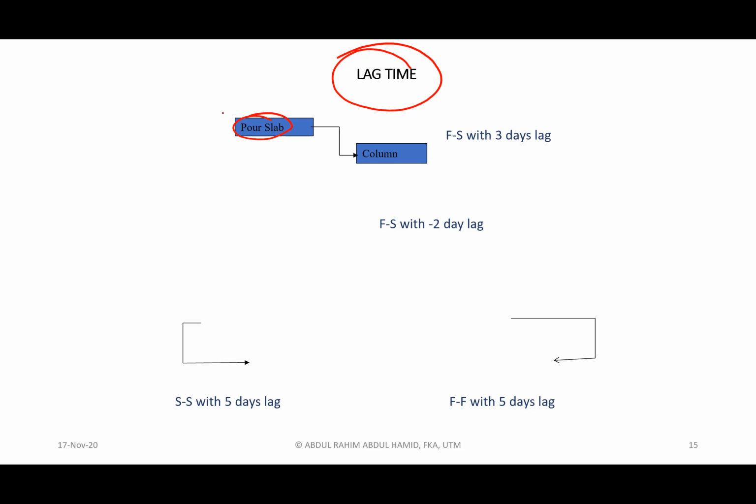But of course, that column should be constructed on a very firm floor. Otherwise, everything will collapse. So you simply cannot erect the column, put your formwork, rebar, whatever, on a wet floor. So you must wait. This is what we call a waiting period, for curing, for instance. Curing, or waiting for concrete to dry, is not an activity by itself. Well, you can put it as an activity, but normally people do not, because it is simply a waiting period.